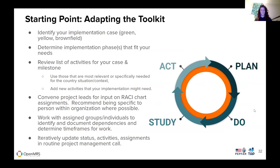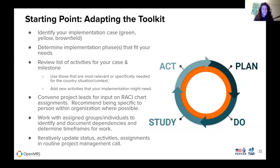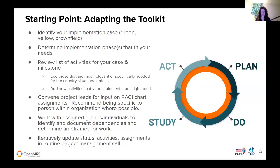Some best practices for adapting the toolkit: first, recognize where you are in your implementation case — are you a green field just starting, yellow field transitioning, or a brown field moving from one OpenMRS instance to another? Next, determine the implementation phase that fits your needs — are you in the planning, development, or implementation phase? Then review the list of activities for your case and milestones. Convene the project leads for input on the RACI chart — that's the responsible and accountable traditional project management approach where you assign different people different roles on a particular project plan.